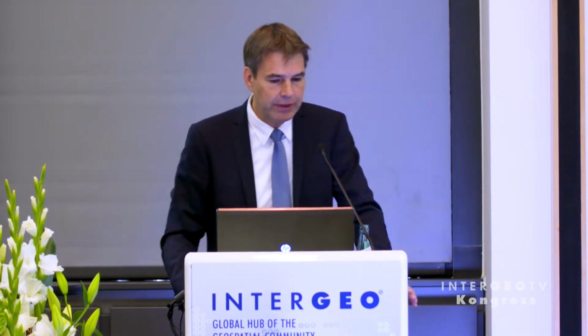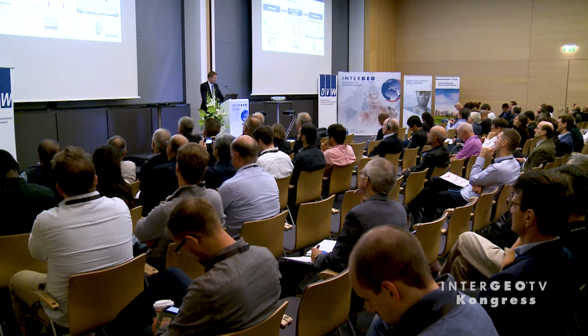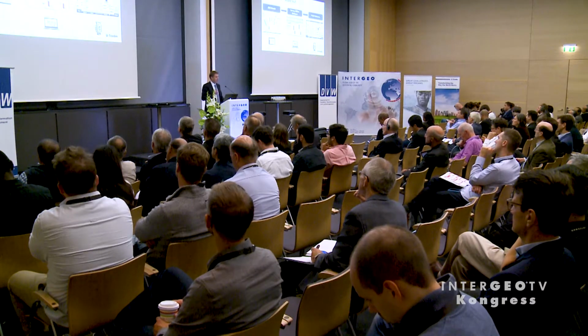The next step, going back into the field. So we now have a BIM model. It can be a BIM model of an infrastructure project, it can be a BIM model of a building, and this is in any design software. So we still have a bunch of design software out in the field, but there's one common interface, the IFC interface, which is defined by the buildingSMART organization. And this is supported by everyone. The only problem is you have to keep in mind that you lose information at this point. When you go from the BIM model to the field, you have just the model. You don't have the design itself which is behind it, so you transfer only the elements.